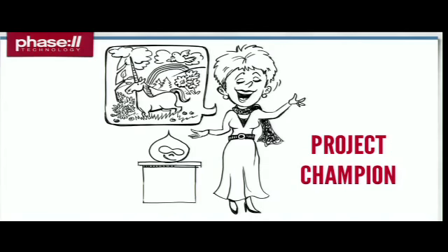A project champion is a really great asset to have inside of an organization because they're going to be the ones that go and speak volumes about you and go and promote you and work through an organization to make sure that there's buy-in. But they can also be almost as damaging as the saboteur. And a lot of it is because they set unrealistic expectations of what you're able to accomplish. In addition, a project champion might not actually have buy-in from everybody inside of the organization. There could be political rifts.